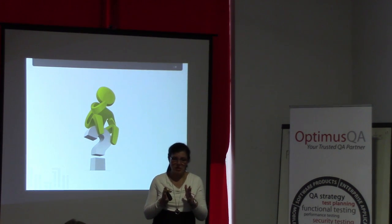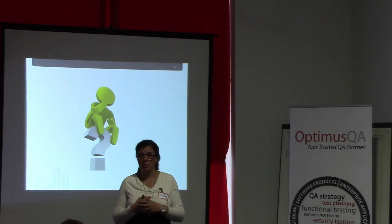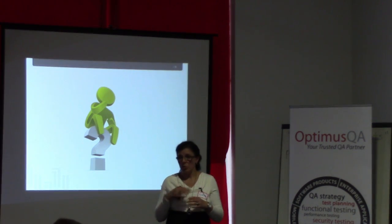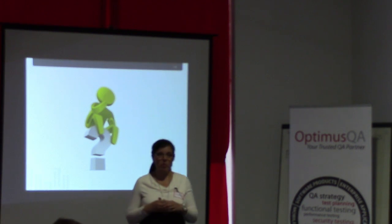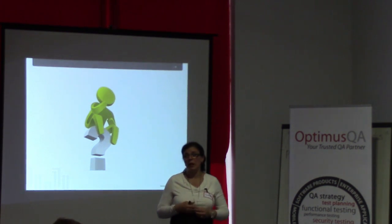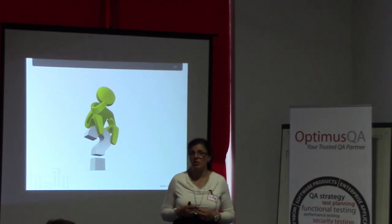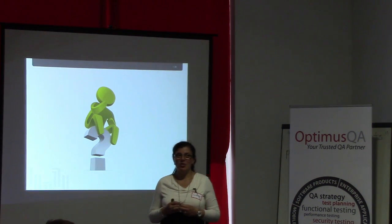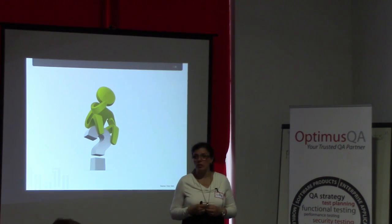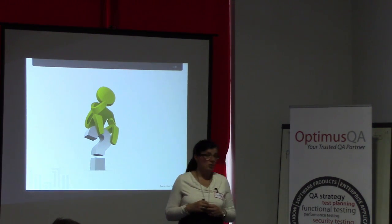allocation of the resources every month, and we all get together, line managers with the planning manager, and we review the projects that are on the roadmap. And then we also review the demand. What I do is I look at what my demand is. This coming month, June, I'm actually 570 hours short, which is about 4 people. So I had a talk with our resource and planning manager, and I said, these are the numbers. What is it that you want me to drop?